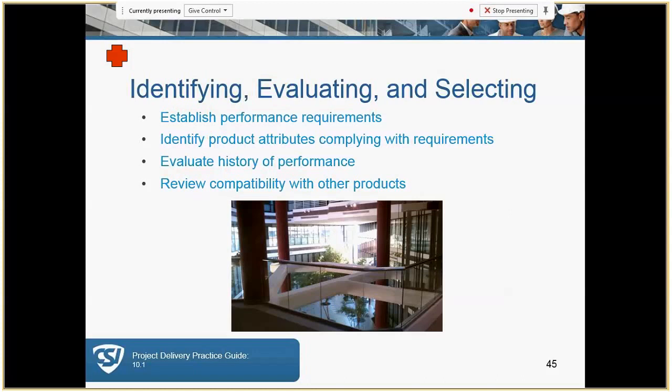A good example here is people continue to push for solar, but a lot of these solar laminate companies, within a year or two they're gone, and as an owner you're left with something that you can no longer use. And so if you see some reluctance in using some of the newer products, that's why, especially with an owner that will hang on to a property 40, 50 years plus.